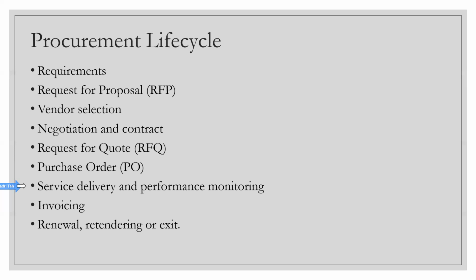And that is something they will be sharing with us, maybe the focal in our company. Sometimes they may not share the entire manufacturing cycle, but they will say, yeah, order has been received, shipment pending. So between order received and shipment pending, they will be doing the manufacturing piece. And once they have started the shipment, they will let you know, and then it will take its usual time to arrive on your doorstep. If it's by air, great, it will take a very short time. If it's by ship, it depends, 1 week to 10 days.